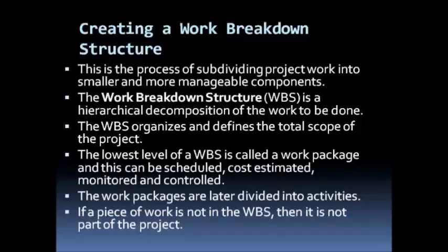If a piece of work is not identified in the WBS, what it means is that that piece of work is not part of the project, because the WBS breaks down the total scope of the project.